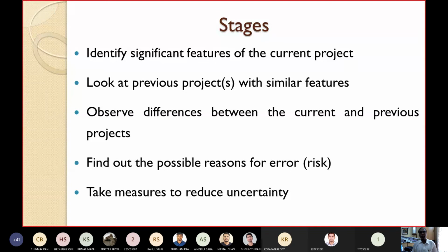Look at the previous projects with similar features. Then observe the differences between the current project and the past projects. Then find out the possible reasons for error.